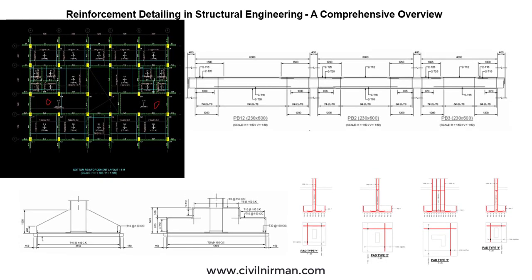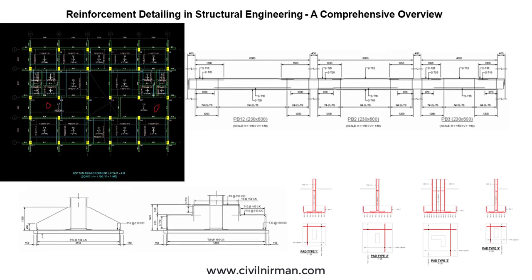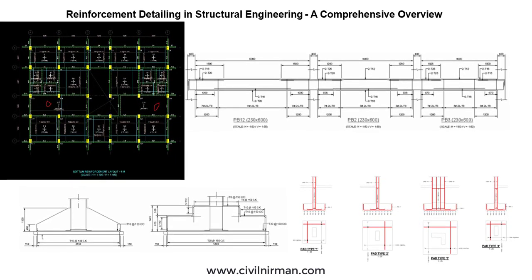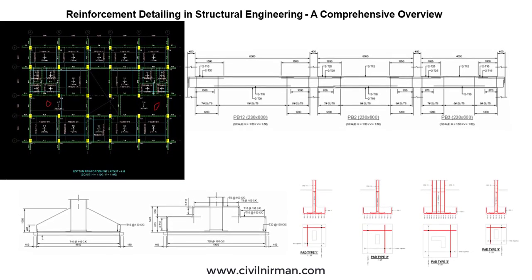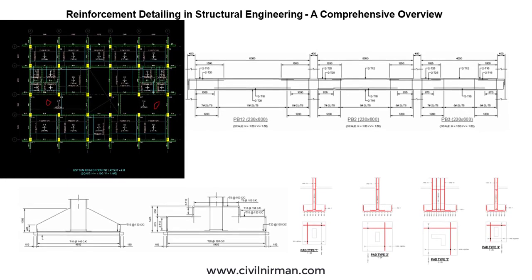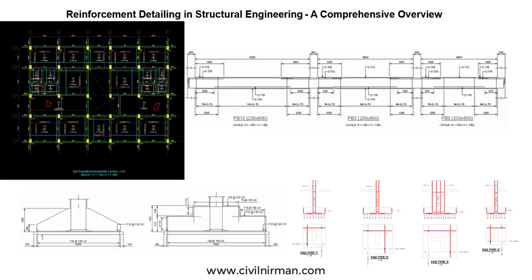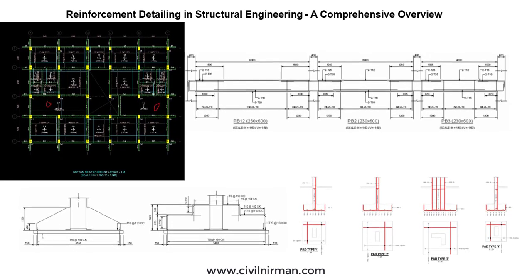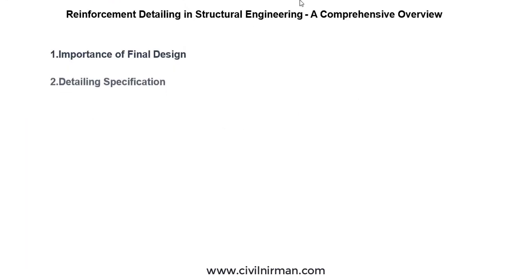So it is important that detailing is carried out with the responsibilities and adequate timescales clearly defined. Issues such as site constraints, relevant standards, laps, covers, concrete grades, holes, detailing preferences, etc. must all be covered. This requirement should be formalized into a detailing specification. The requirements for the whole structure should be handed over and explained to the detailer at a single point in time.